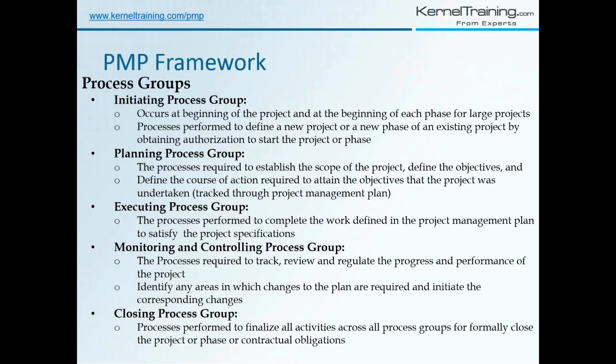And the output is the project charter, where higher level constraints are defined, where higher level schedule, higher level scope, higher level cost is defined, high level requirements are defined, what is required from the project, all high level. Remember, very important, all high level requirements are defined in the project charter. All right.